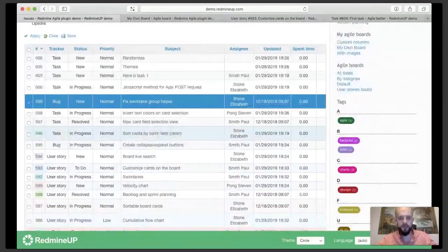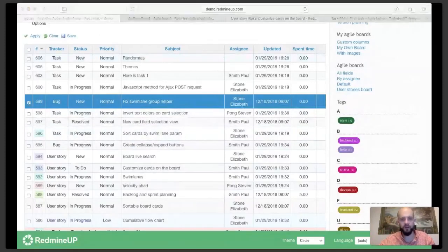You distribute them among team members, each one of them, when you go task by task. Here is actually how the planning looks for Agile. Once you have closed the last sprint, or just in the beginning of opening a new sprint, you prepare. First thing you do is prepare a backlog of the items. Then you go through this backlog.